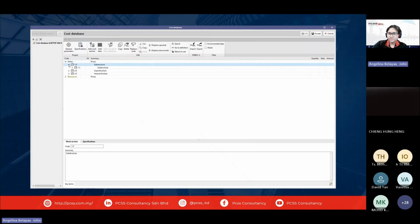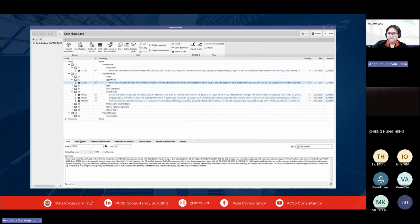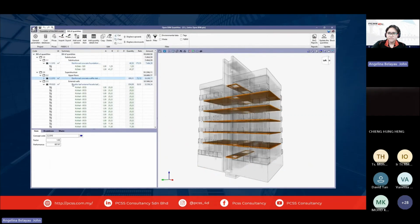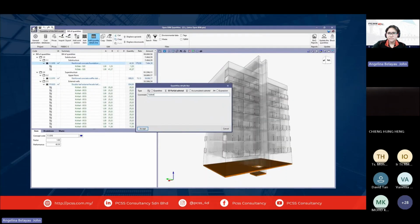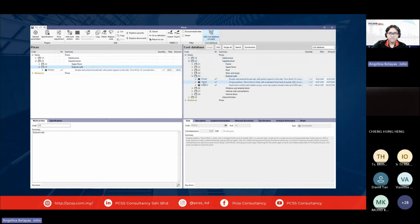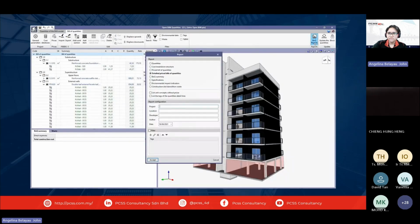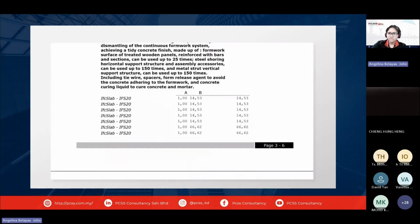In order to facilitate assigning prices to the concepts of quantities, the application allows databases to be created and used in multiple projects. Once the set of measurement rules is applied, the bill of quantities is automatically created. The results can be edited, and the application also allows additional information to be added to justify the calculation. The prices of the concepts taken from the databases can be modified to adapt them to the particularities of each project. Finally, Open BIM Quantities allows the output of bill of quantities information by means of reports that can be exported into different formats.